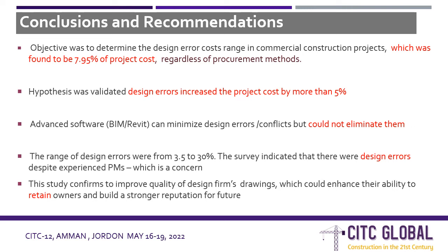And the range, which I already mentioned, was around 3.5 to 30% was the overall bandwidth, in which the majority accumulated around 5 to 7.5%. And the study also confirms that this is an overall realistic stock of design error percentage increase for the project value, on which the design firms can have an introspection to improve the design quality so that they can minimize the design error cost implications.